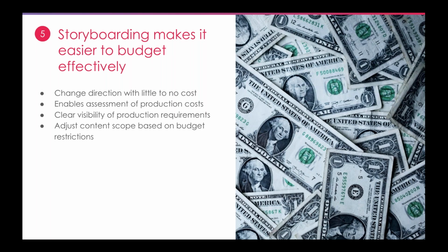Number 5, storyboarding makes it easier to budget effectively. Your storyboard helps you to control project costs in a couple of ways. As we were picking up earlier, we're leading to efficiency and ensuring we're focusing on those learning objectives. Because firstly, it allows changes in direction to be made with little to no cost because we're still at the planning stage. You lose nothing by scrapping an asset at the storyboard stage, as we've not yet invested the time in its creation.